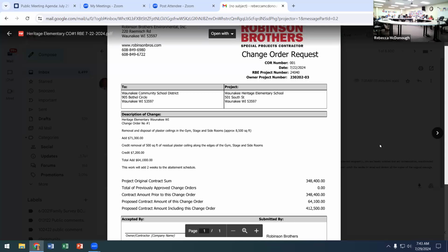They contain the entire gymnasium, which they were going to do anyway. They seal off the doors with plastic, seal off the HVAC system, and put poly walls in place everywhere. Then you physically go up on man lifts and drop that plaster ceiling, which is 20 feet up in the air.